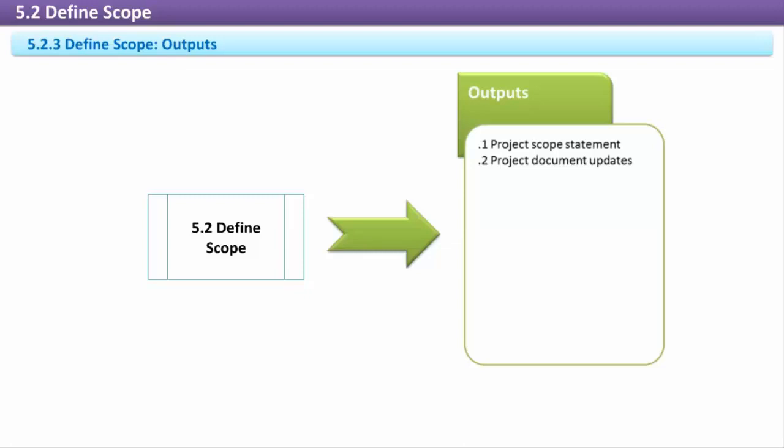The project scope statement details the measurable goals, objectives, deliverables, and requirements of the project, and what the acceptance criteria of deliverables will be. It also describes the work required to meet all objectives and deliverables of the project, and it also contains milestones, assumptions, risks, and costs.